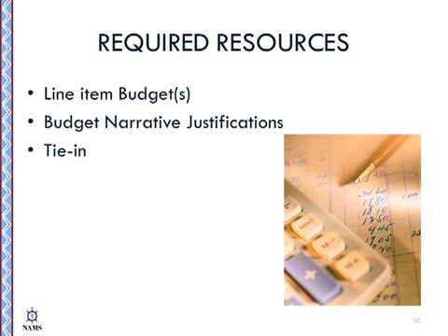When you're writing your budget justification, provide detail for the ANA proposal reviewers to determine if costs are allowable, relevant, and reasonable. Make sure that your written explanations are easy to understand. Explain your budget calculations and keep them basic. For example, if you include the cost for travel to a seminar in your line item budget, using your budget justification, I should be able to arrive at the same cost for that trip.